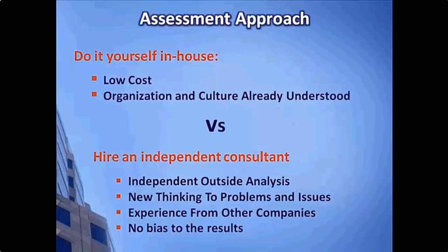One consideration is, how do we want to approach the assessment? We typically have 2 key choices. We can do this in-house with our own staff, our own IT people, or we can hire an independent consultant. If we do it in-house, the advantages to that approach are, number 1, it will be very low cost, and number 2, the organization and cultural aspects are already understood. In other words, your IT people already know how you operate, what your values are within your company.